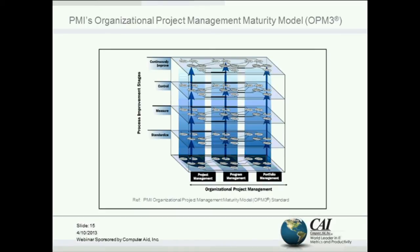PMI has an Organizational Project Management Maturity Model — what they call OPM3 — and they use essentially the same kind of model. Instead of five levels they've simplified it down to four, assuming most people today are not at the chaotic level with zero processes. So the first level is to standardize, the next is to put in measures, the third is to control, and the final level is again continuous improvement. They've also added further dimensions: as well as project management, the model covers program management and portfolio management levels.